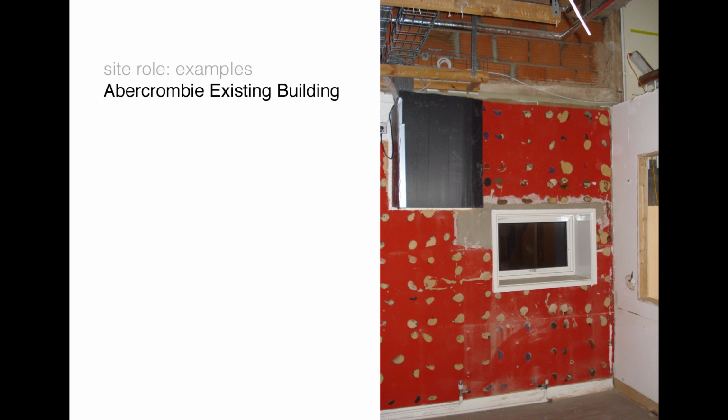That stud wall was down to stay, but really in that condition, okay, we'll take it down, we'll build a new one, it'll be quicker for the contractor to do, we'll get a better finish at the end of the day, it's not going to cost the client very much money. It's probably no more than lining it over wood. So those sort of decisions are very easy to take for the benefit of both parties, and for the client.